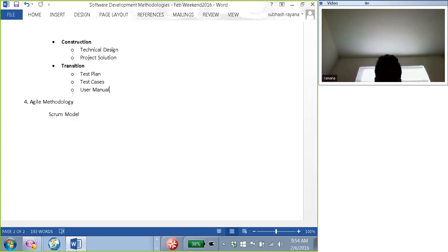But technically, if the business who is sponsoring you and funding you is asking for something, you cannot blindly say no, or say that we agreed on a date and I don't care what you're asking. That's not how it works, right? You have to be accommodating. But from a process perspective, yes, you will have an agreement with the business saying, this is where we are starting your requirement gathering, and this is the cutoff date. After this, anything that comes, we will not be able to accommodate in the current release. We'll probably consume it and deliver it in the next release, but not for this release.